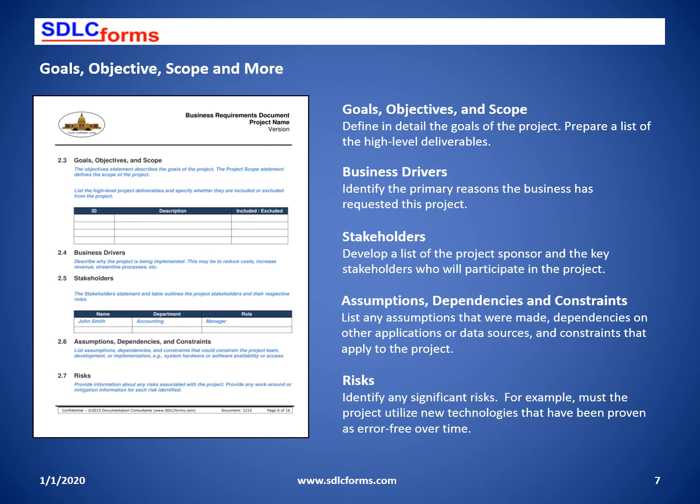Precisely define the business goals. The list of deliverables should identify a meaningful description of the deliverable and whether it is included or excluded from this phase of the project. The business driver should identify what motivated the business — was it to reduce costs, meet regulatory demands, process improvement, etc.